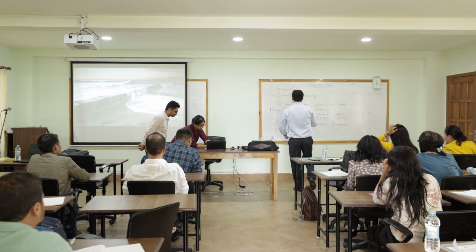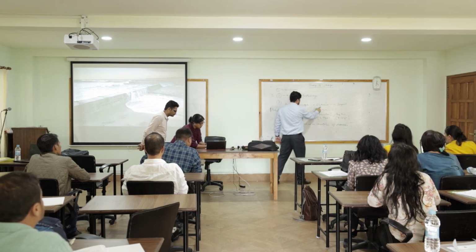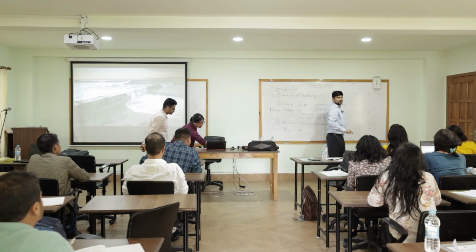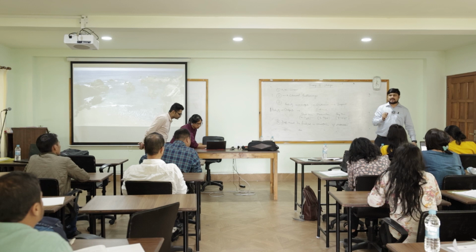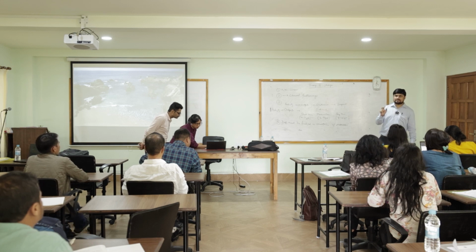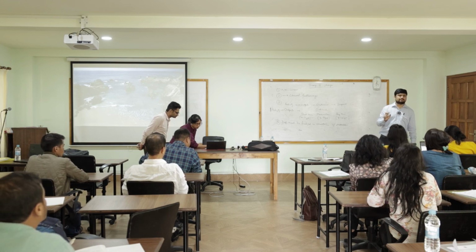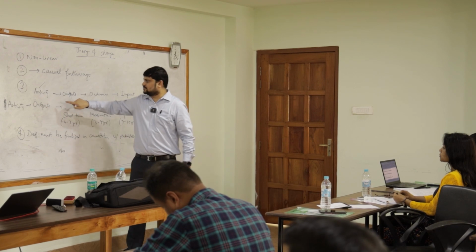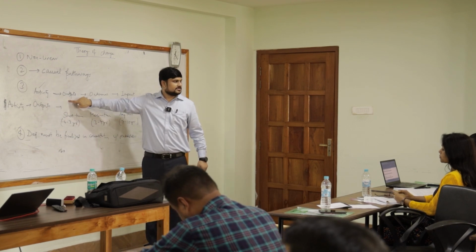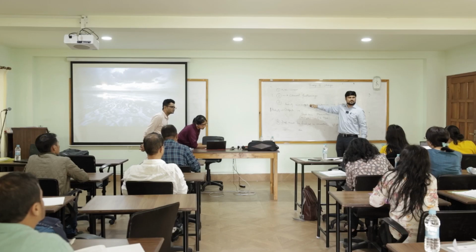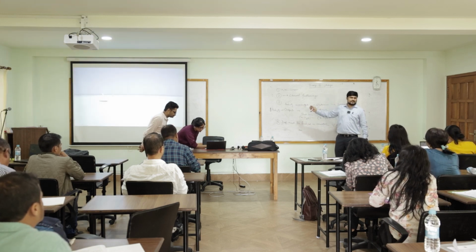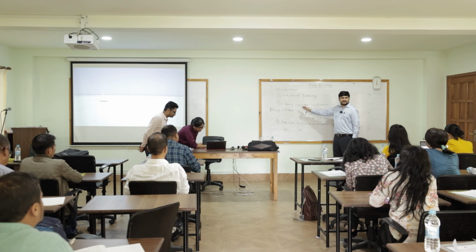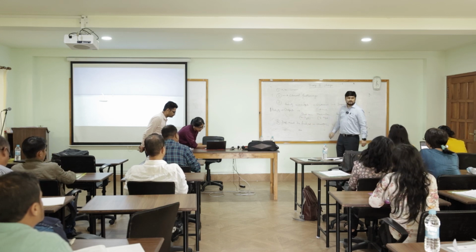If I talk about activity, outputs, outcomes, and impact, on which of these four components does the implementation team have control, or can be controlled by the program team? If this can be controlled, there is a good possibility that to a certain extent the outputs might also be controlled, right? But the surety or the certainty reduces from the activity to the outputs.